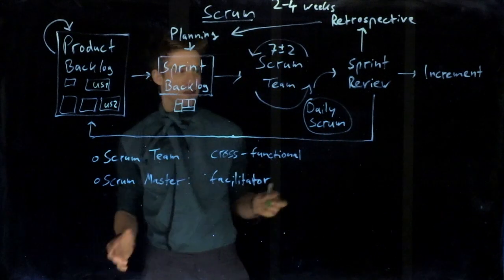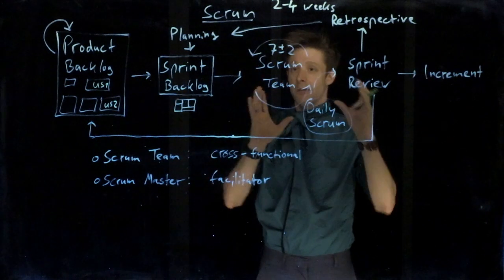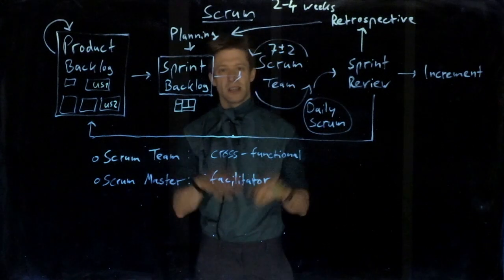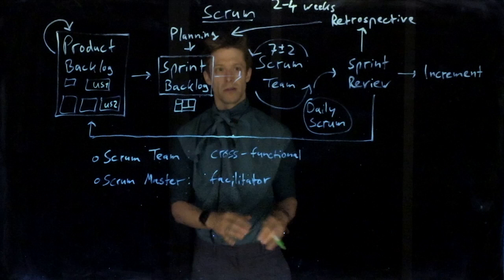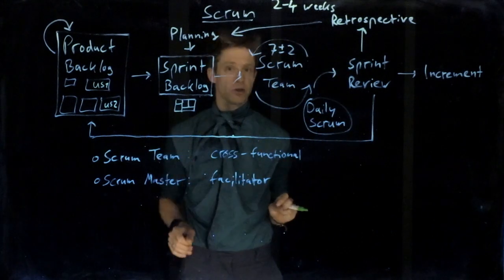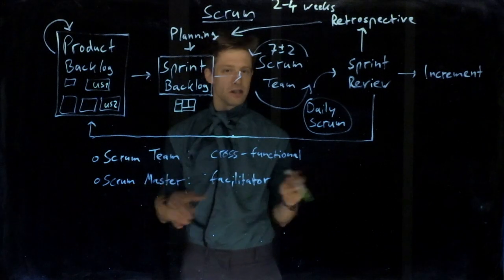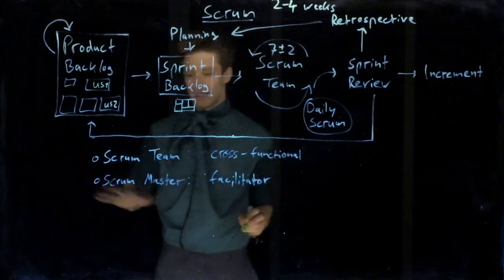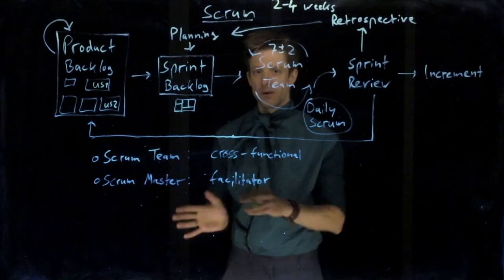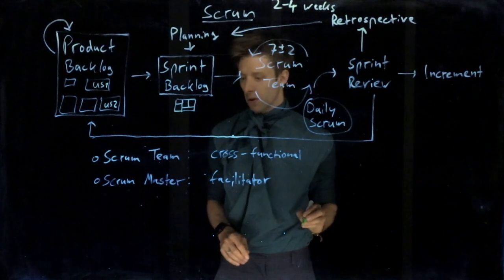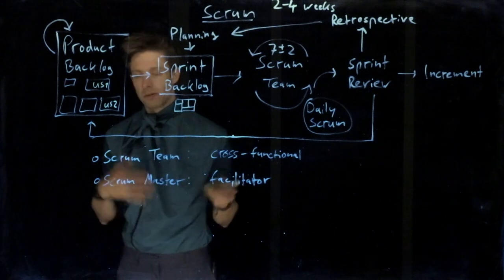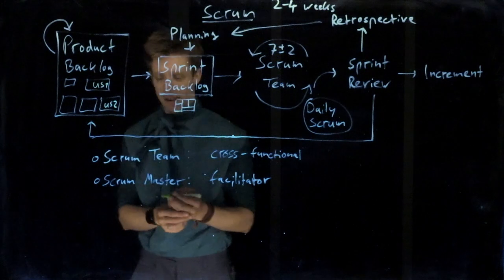The other thing the scrum master does is communicate with the outside world and, more importantly, protect the team from the outside world. If someone comes and wants to assign the team something or wants them to do something else, it's the scrum master's role to say, no, we are working on this user story right now, and we're in the middle of the sprint, so the team is not going to do something. That's basically the scrum master. Process improvement, reminding the team what they should be doing, and protecting the team from the outside world. But the scrum master is a team member as well, so he or she is also programming, testing, just like the others.